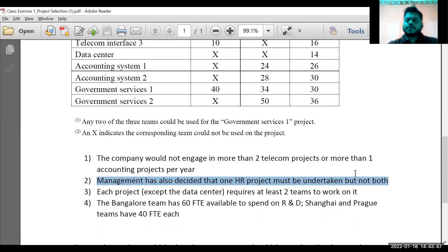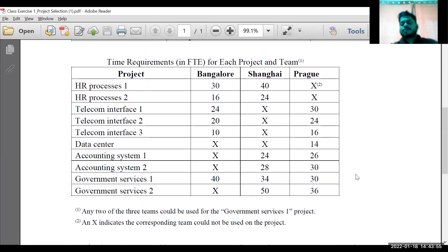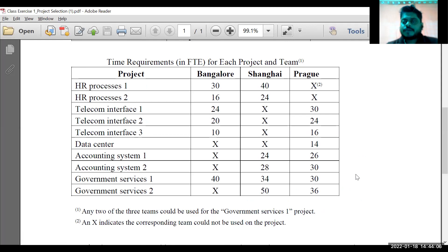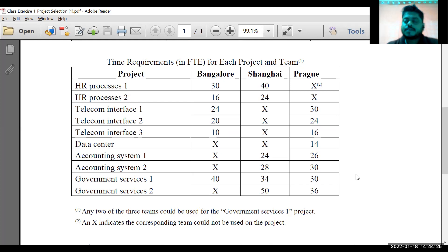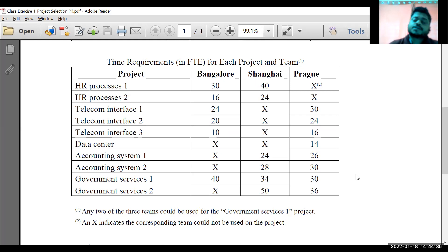No matter what you select, one HR project needs to be there. Some of you have done resource-wise calculations — how many resources are utilized — that is a good way to look at the project, but that will come later when you are trying to increase project productivity. The simple case here is which projects to select based on project net benefit. There are many ways to look at this: regulatory requirements, tangible benefits, employee morale — but in this particular case we are trying to select based on net benefit.